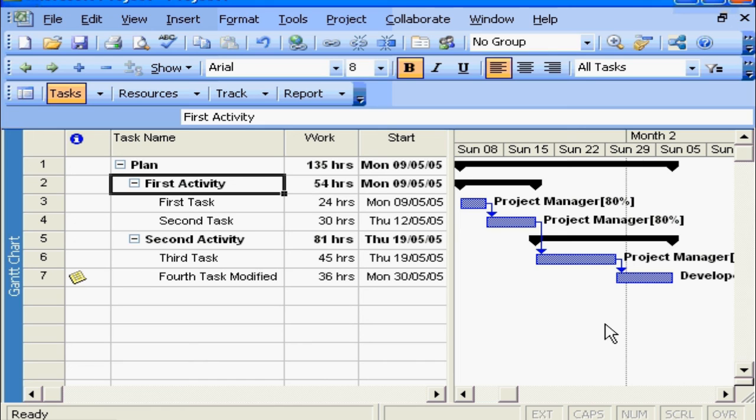We added dependencies, and we've managed and reiterated and done the appropriate number of revisions and rework for our project plan till we got to the point that we had a project we believed in, that we were happy with the results. We did a save to the baseline, and we have our go-forward project plan that we're going to use to deliver and manage our project against.